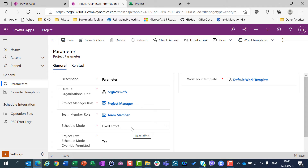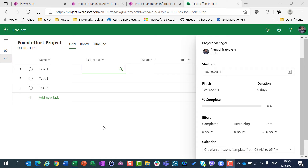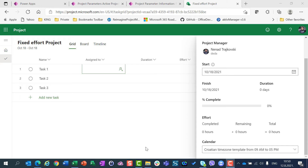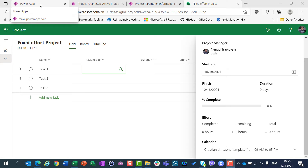These changes affect only projects that are going to be created in the future. Now let me show how a project behaves with Fixed Effort scheduling mode. I have created a new project with a start date and calendar. Be aware that schedule mode cannot be chosen when you create a project from Microsoft Project for the Web — it can only be set when you create your new project via PowerApps or Project Accelerator, which will be explained in my next video. When you create a project using Microsoft Project for the Web, the schedule mode will be the default schedule mode defined in the settings.